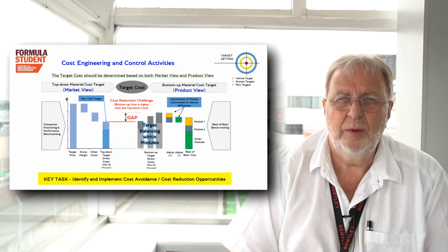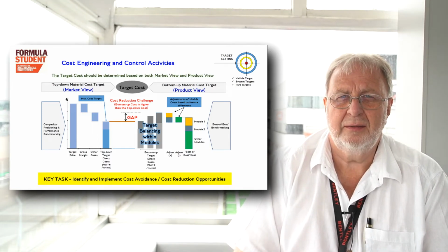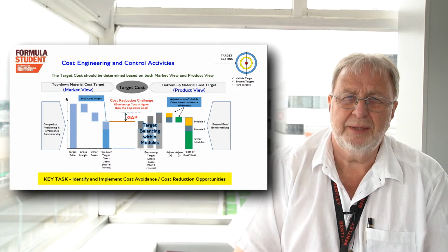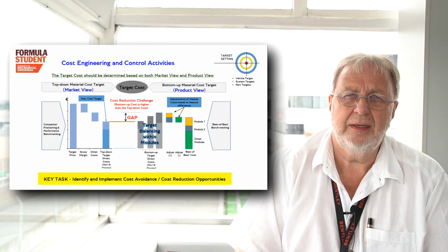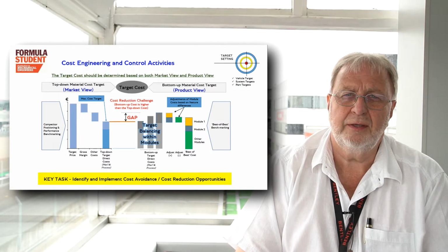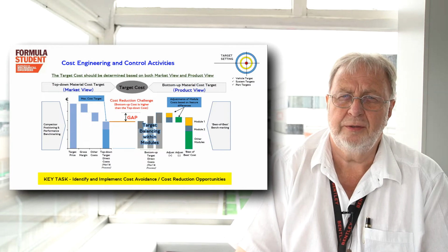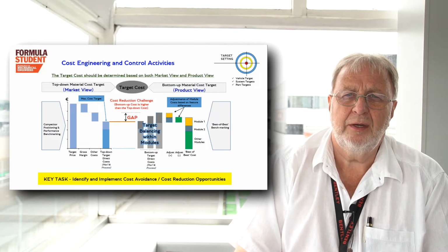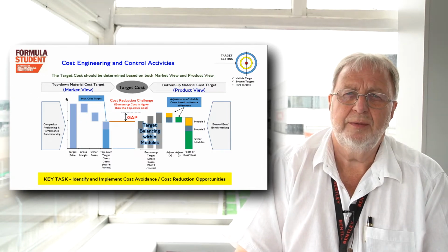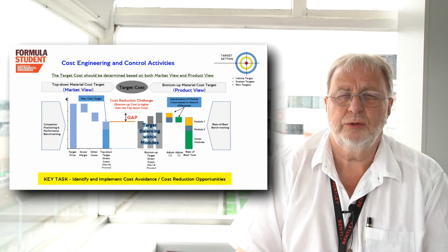So when we look to set targets in the automotive industry, we go from two standpoints: a top-down point of view, looking at the benchmark from current vehicles or competitive vehicles or historical vehicles that you've manufactured at universities. And then we also work from a bottom-up, based on what we'd like from a design point of view. How much will this cost, or should it cost?